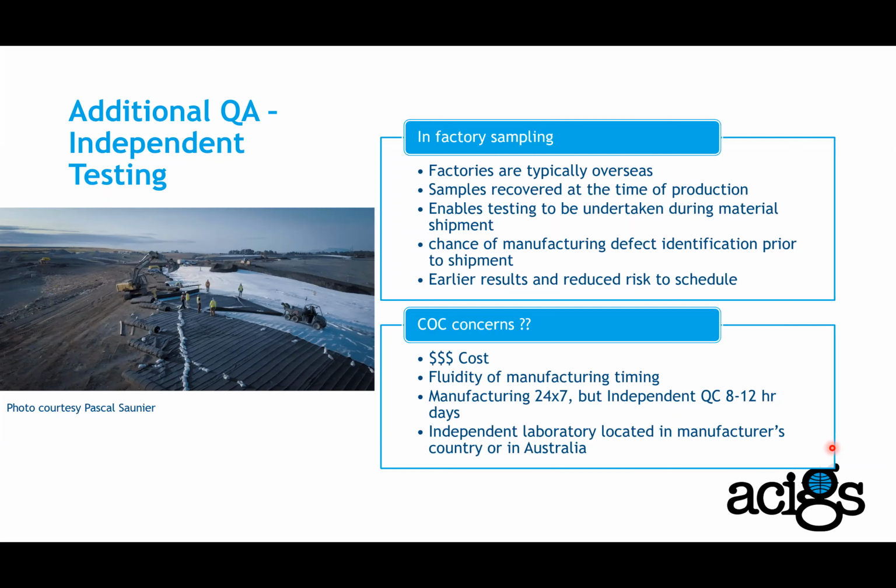However, we need to consider some concerns here, such as costs. Obviously, having someone in the factory will have some costs associated with that. Also, fluidity of the manufacturing timing. As we know, the manufacturing timings are very fluid. So you normally get a window of production for your material that is between this date and this date. And as you get closer to that date, it changes very frequently.